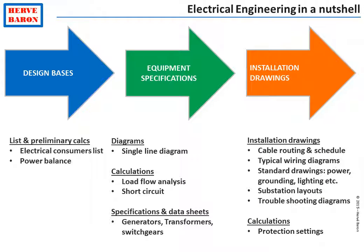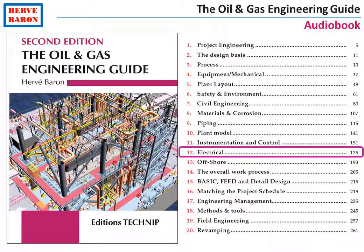This synoptic summarizes the work of the electrical engineer: it starts with the inventory of all electrical power consumers and calculation of overall plant power demand, then the electrical power distribution system is designed and distribution equipment is specified. Once equipment is ordered and vendor drawings received, all installation and wiring diagrams can be issued. This concludes the presentation of the work and deliverables of the electrical discipline. Thank you for your attention.